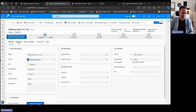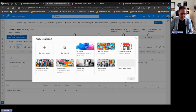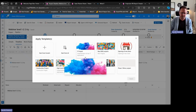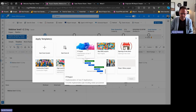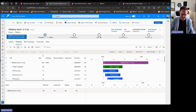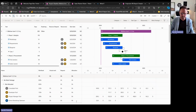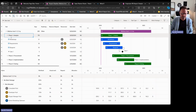Well, let's start a project that has defined a lot of resource need based on best practices. In this case, you can see behind the project is quite empty. There's no task at all, but I could actually go and have created, or the PMO could create some project templates that actually has the information of best practices and the resources needed for this kind of project. So by clicking the template, I will import all data. It will be task data, it will be phases, stages, milestones, whatever, but it will also put in resource management information. So if you look at the very top, I can see at level 0, my project, the breakdown structure, and in my breakdown structure, I can identify in the resource column, there's already resource management information.